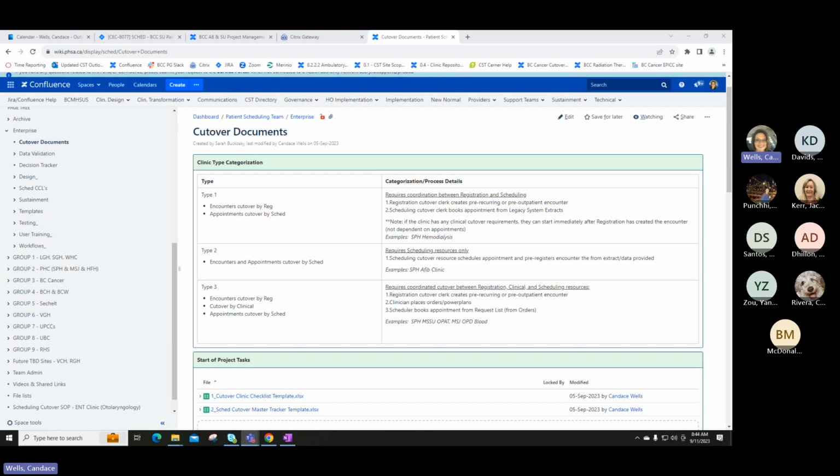We've used that during cutover, and then the actual clinic work queues are turned on immediately before go live. I think we do this because when you're using work queue monitor in cutover, you're entering the information that you want to get cut over, and you don't necessarily want outside referrals to keep coming into that queue prior to go live.